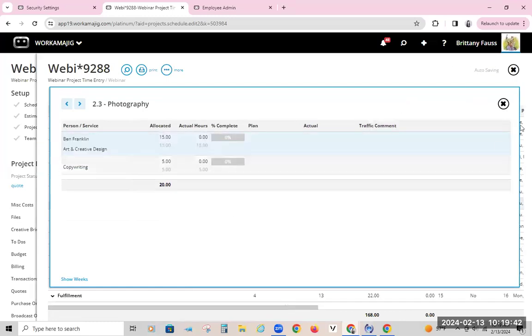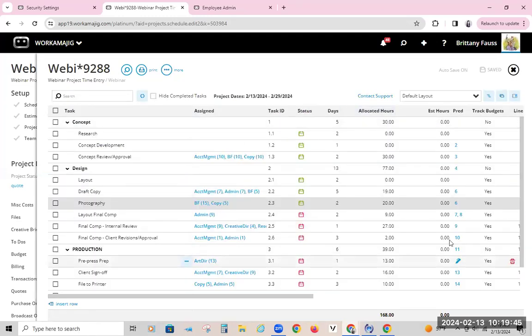Okay, so Ben's going to be assigned, we'll just do 3 different tasks in here. Now, obviously, these tasks do have predecessors. So I talked about being able to see predecessors, being able to track time to something where the predecessor is not complete. Ben does not have that right. So even though he's assigned to 3 different tasks in here, he really won't be able to put time to every single one of those just because that predecessor is not listed as complete.